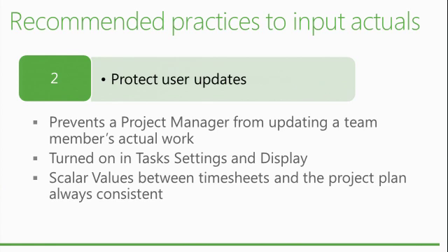Okay. So I think this paper needs to be expanded a little more to explain why a value would not be exactly the same as the one you entered, right? But we have seen that, and someone was mentioning the 0.99. What it will do for you, though, from that timesheet, when they enter 32 hours for the week, they're going to get 32 for the week. It's just, it may not be 8, 4, 6, 4, 8. It may distribute it. Yes. But you'll still get the 32. Yes, it will, but sometimes the distribution is a little different than what you were expecting.